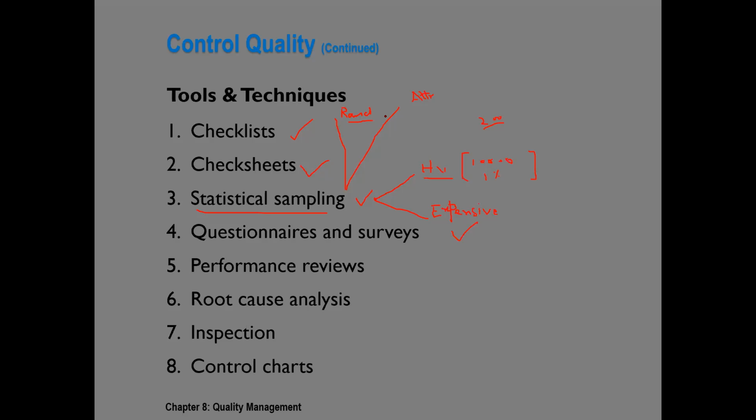And also if you take the example of doors again for a multi-story 5-star hotel, where there are, for example, 10,000 doors, random sampling is out of 10,000, you check 500 doors for their width, their height, their length. The other way is instead of checking width, height, or length, you only check the width, but for all 10,000. The first one was random sampling. You chose the sample randomly. In the second case, you just chose one attribute and checked the whole lot. So that's the difference between random and attribute sampling.